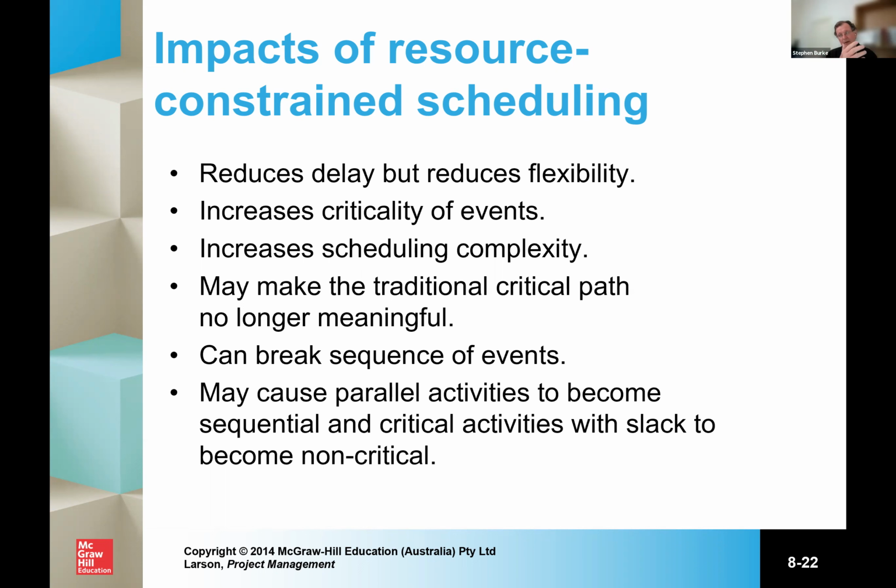This might depend on what the type of project is, to what degree are there technical specifications embedded in the project which you can't change. But what this will do, it will increase the criticality of events. So all of a sudden, everything becomes more important because there's less resources, greater risk, there's less time, less slack. It increases the scheduling complexity then.